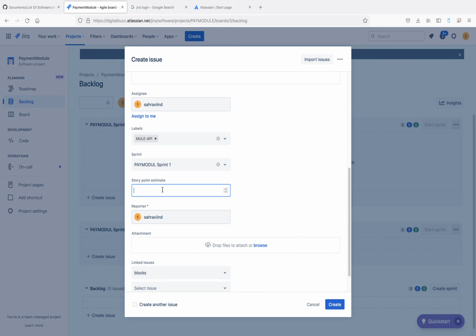The number of man-days required to develop that API will depend on who is going to develop it. Some developers may have good efficiency, and some relatively low, based on their experience. So the number of man-days will vary based on the efficiency and proficiency of the developer.